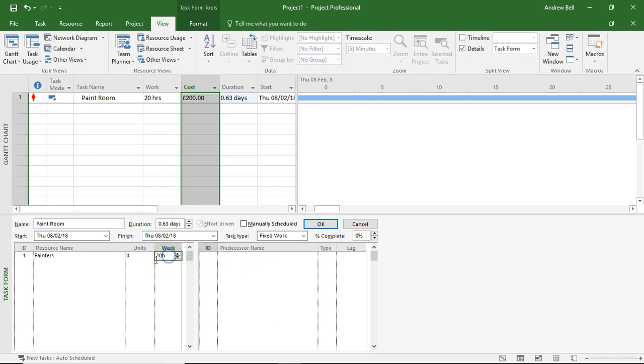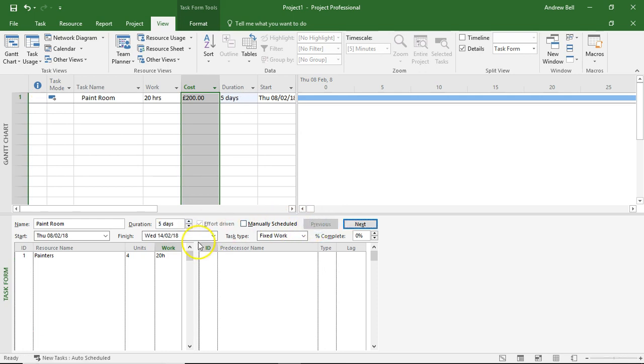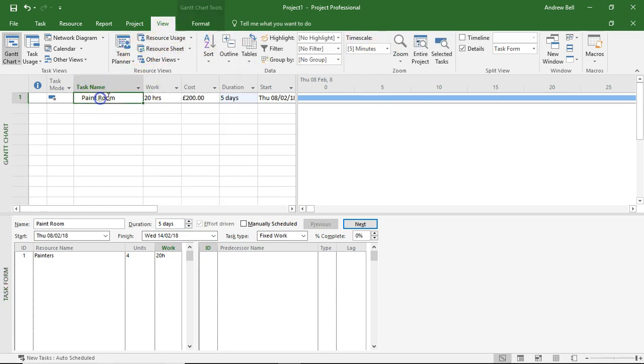So we've got an estimate of 20 hours of effort. Then we can put in a duration, let's say five days. And the computer, if you select this task,